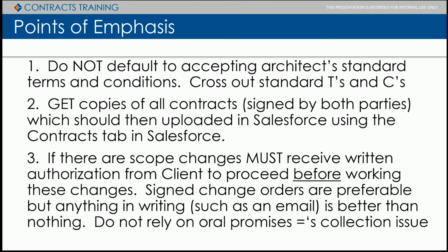Okay, and the way you can figure that out is there's what's called a revision report, which goes with the licensing of the software. If you get an AIA agreement sent over and you're unsure because it looks a little bit different, ask for that revision report. Because those terms and conditions are copyrighted and trademarked, whenever they're changed, it generates that report. So you want to ask for that report because it will show you exactly what's been added, taken away, or changed.